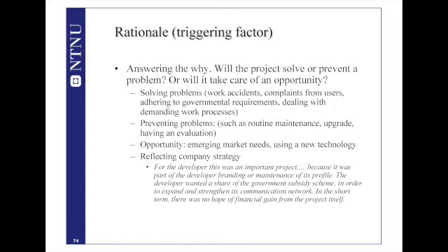Let's look at some of these. When the project is initiated to solve a problem, this problem could be something like work accidents, repeated work accidents. All the time something goes wrong. You have to address that. Maybe you get frequent complaints by the end users. They complain about the quality of the product you have delivered. Maybe they complain about safety, some safety issue, some functional issues. You need to address that.